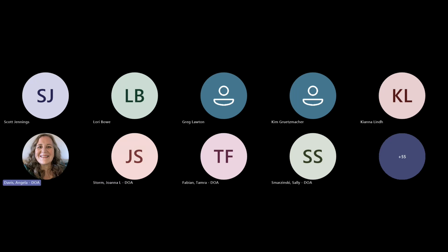So once July 1 hits, you are considered in non-compliance. So you wouldn't be eligible for a payment until you're in compliance. Are those costs reimbursable? Yes, but you'd either be looking at prior to the construction start date or after the date you come into compliance. The goal is not to be in non-compliance.